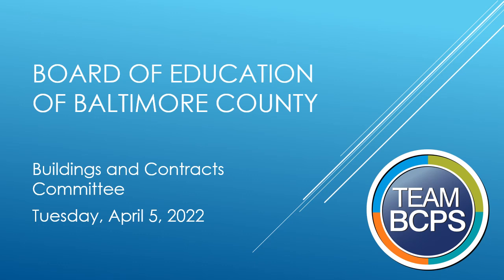Sure, absolutely. Let me tell you what the scope of work for this project is, and that'll give you an idea about why it could vary. In this case: removal of existing rubber surface from running track, long jump and triple jump runways, demolition of pole vault runway, construction of new pole vault runway, installation of new rubber surface, painting and marking on running track, long jump and triple jump runways.